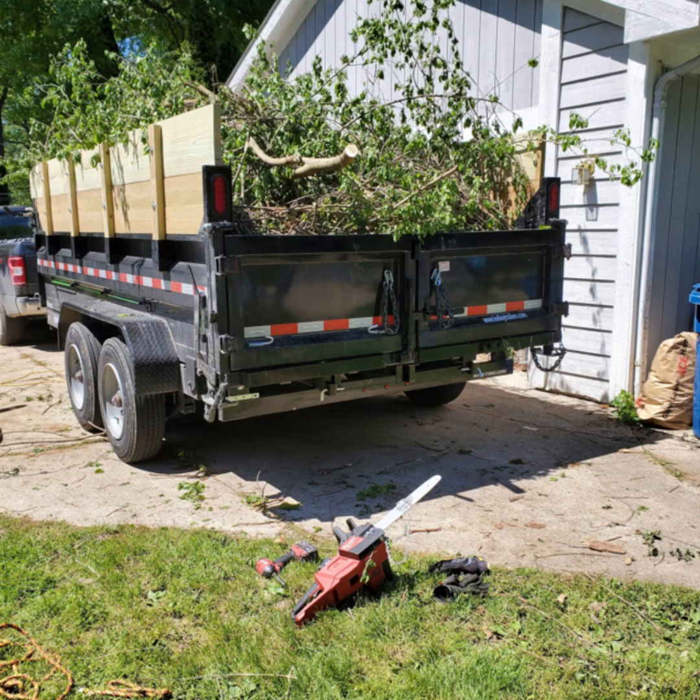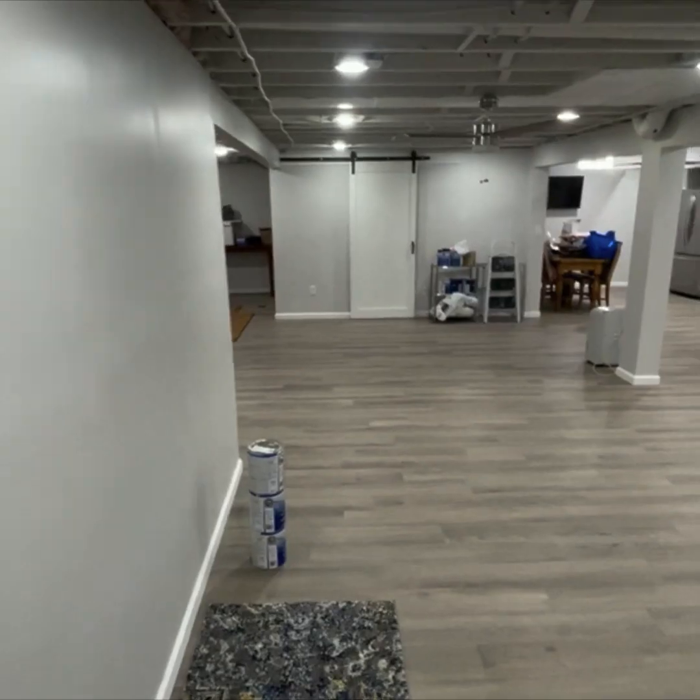This job, foliage was a lot. I bid for one full dump trailer, and it actually took two. So just keep that in mind. Materials are always more than you think they are, and debris is usually more than you think it is as well. And plus, people dump stuff into your trailers and your debris removal tubs, whatever you want to call them. But keep that in mind.